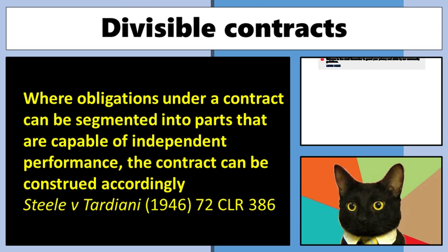It is just as commonsensical as it sounds. So even though the contract strictly says 10,000 posts, $10,000, you deliver 9,000 posts or 8,000 posts. All right, the courts are very likely to say this contract is cleanly and clearly divisible. Therefore, we're going to deem this part to all be discharged, done, and the rest of it is the bit that you can fight over.